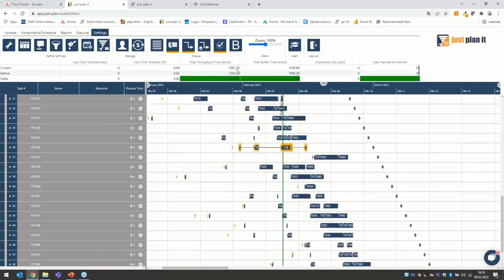improving WIP and handling buffers, which equals risk. So you have to give up some of your buffer, meaning you have to increase the risk of being late, but therefore you win in terms of having a better work in progress.